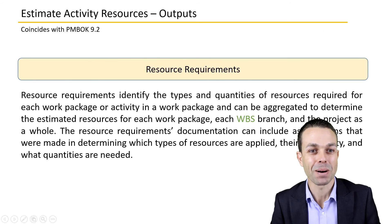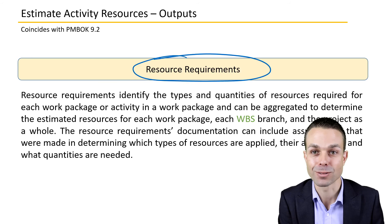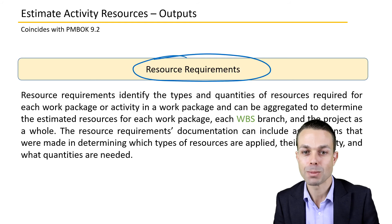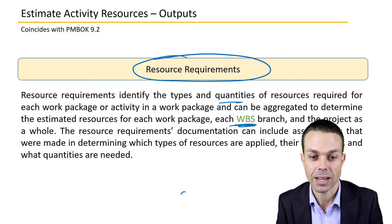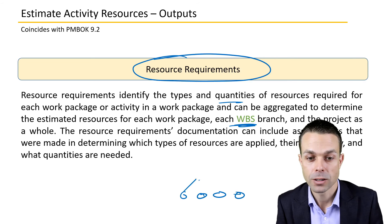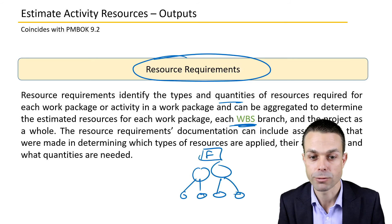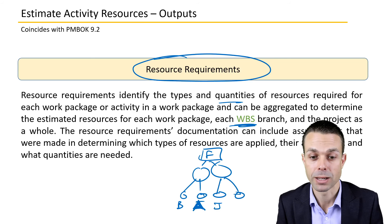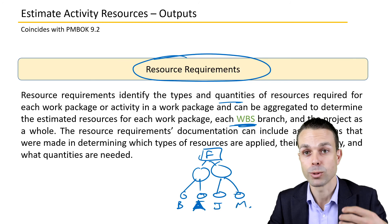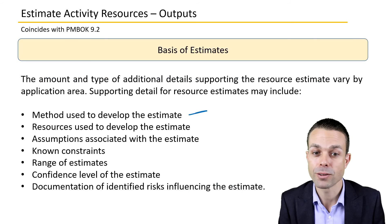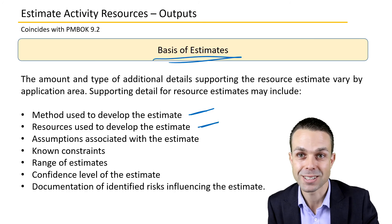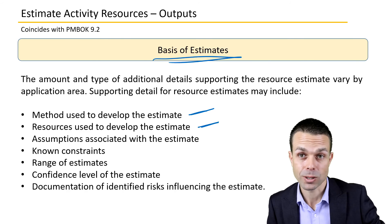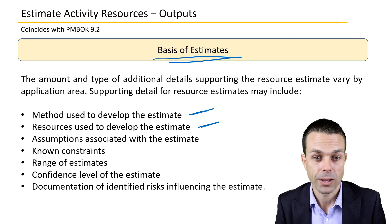The primary output is the resource requirements, which identify the types and quantities of resources required for each work package — typically at the lowest level of the work breakdown structure. For each activity, we identify who is required: for instance, Billy, John, and Mary, whoever has the expertise. We also produce the basis of estimates, which documents the method used, the resources consulted (such as the functional manager who confirmed availability), and any assumptions made.